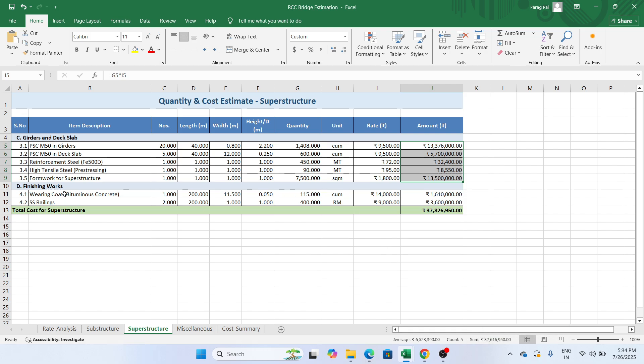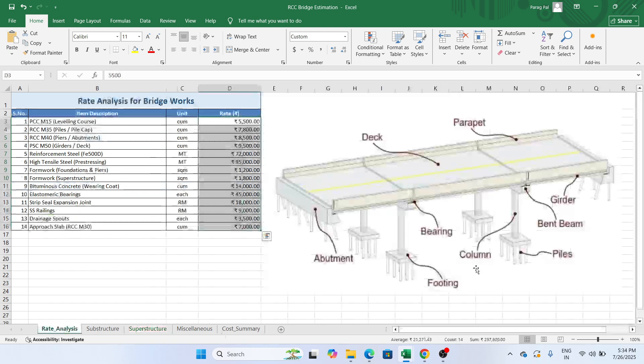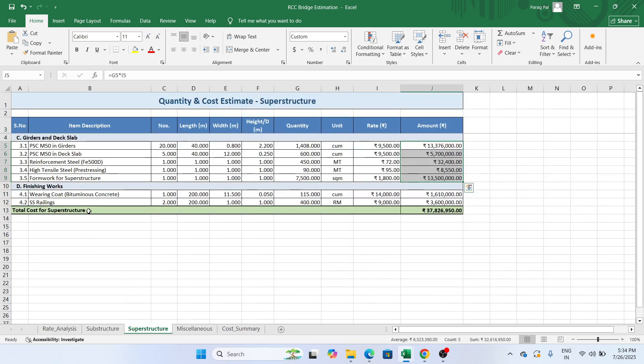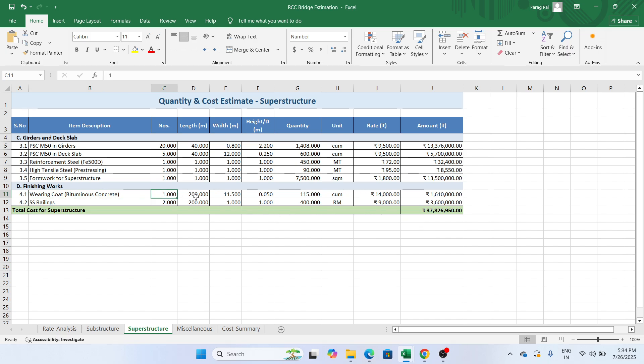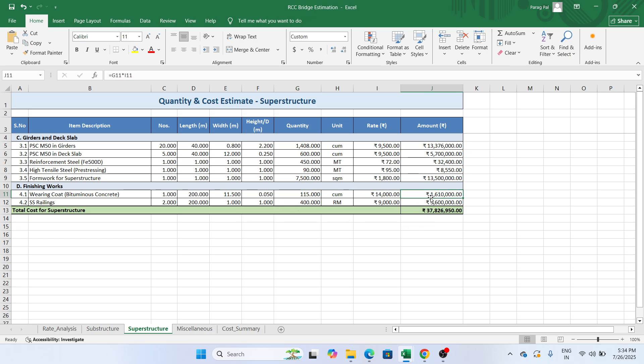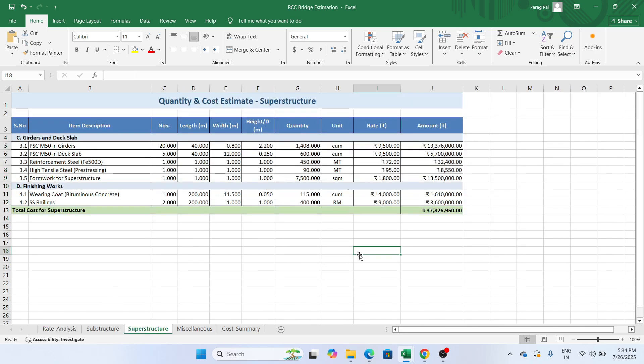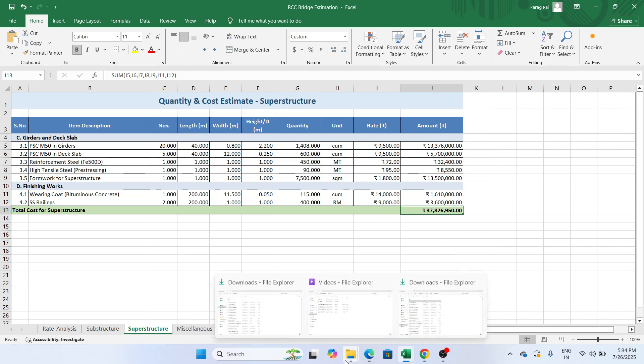Now similarly in finishing work, you provide a wearing coat. Here you can see this is the deck slab you constructed. At the top you need to provide a wearing coat. Bituminous concrete you are applying. One quantity total length, you apply here width and the height. You will get the quantity, you have a rate. This is your total cost for the bituminous work and the railing that you have provided. Just take an example, instead of parapet we are providing railings. You will get a total 3.7 crore for this work.